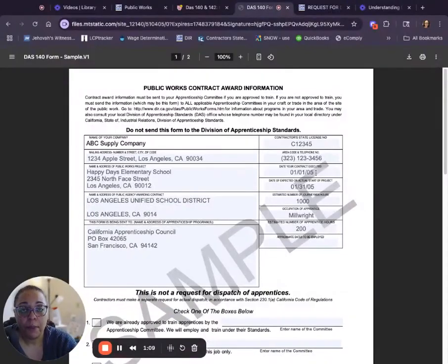We've asked them for a copy of their contract. We can see when it was executed. We know their start date. We know their estimated hours, which then we've separated out that 20% for hours only. And then the approximate dates to be employed. We will happily put whatever that range is. If they say they're going to be there for a couple weeks, okay, it's 5/1 to 6/1.